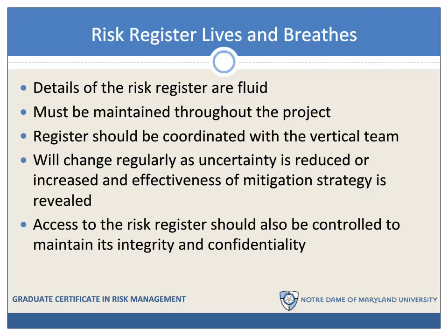The register's entries are going to change regularly as uncertainty is reduced, or sometimes as it increases as you move through a project. In addition, the effectiveness of your mitigation strategies will be revealed through the life of the project, and it will be at times necessary to alter or tweak those strategies. And that's the very point of the monitoring purpose of the risk register. Access to the risk register should be controlled in order to maintain its integrity and its confidentiality.